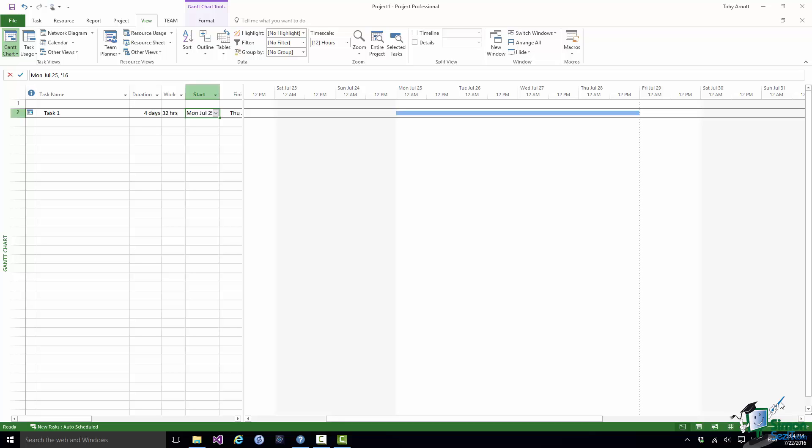But supposing that in order to do that I had used twice as many resources. So although I've achieved three days' worth of value I've used four days' worth of effort. So two people for two days. Now this simple example explains what Earned Value Analysis is all about.